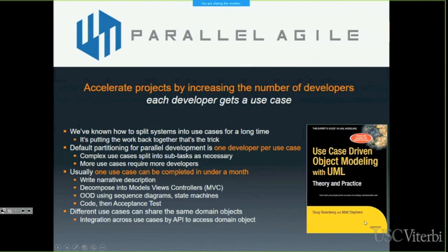I've spent 25 or 30 years in industry, traveling all over the world, teaching companies how to do that. And I've written a couple books on it. And so what we use as our default partitioning is each developer gets a use case. Okay, so that's not an inviolable rule that it has to be one use case per developer, but that's where we start. And if we get a big complex use case, we generally split it up.